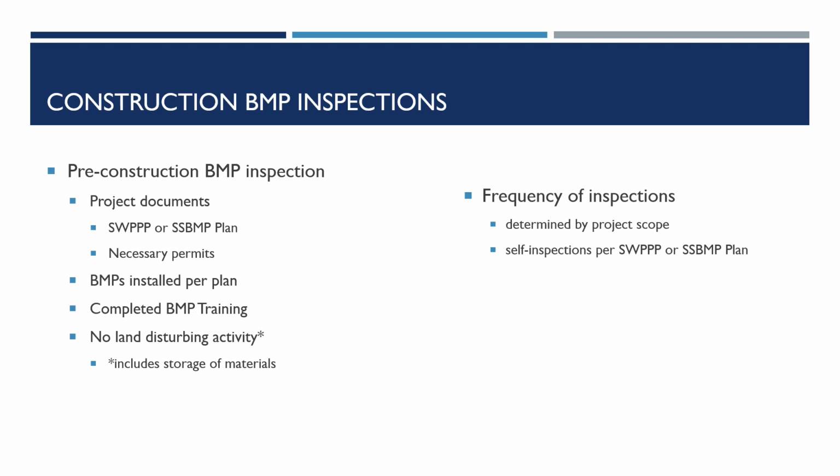The frequency of AirEE BMP routine inspections will be determined by the project scope. A representative from the contractor team should be present to walk the site with the AirEE inspector. We have observed it may be beneficial to have personnel who will facilitate the corrective actions present during the inspection. BMPs in completed areas may only be removed by the direction of the AirEE inspector once all deficiencies noted during the inspection have been corrected.